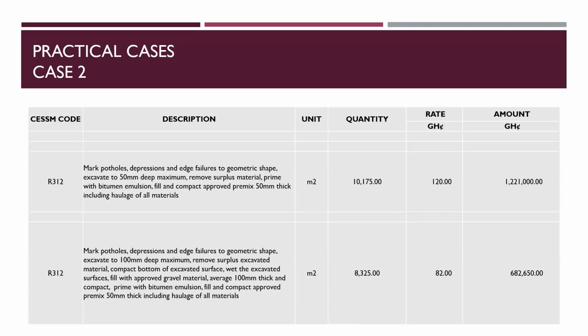Now, when it comes to the practice, the payment or execution, the contractor does nothing about the second item because obviously you can see that he priced very low. Then he concentrated all his effort on executing works on the first activity. I don't want to say only the contractor, but the supervisors and others, we fail to look at issues like this.